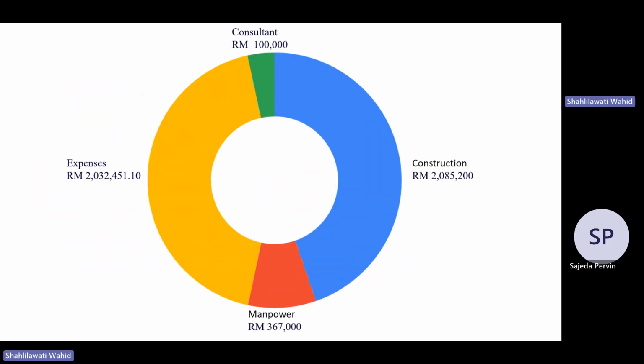So for the entire construction of the project, it will cost approximately 4.6 million, and the remaining 400,000 will serve as a miscellaneous fund for the entire construction. If we face any problems or issues, we will spend the remaining money to solve them to ensure the proper and smooth functioning of the GWBP.